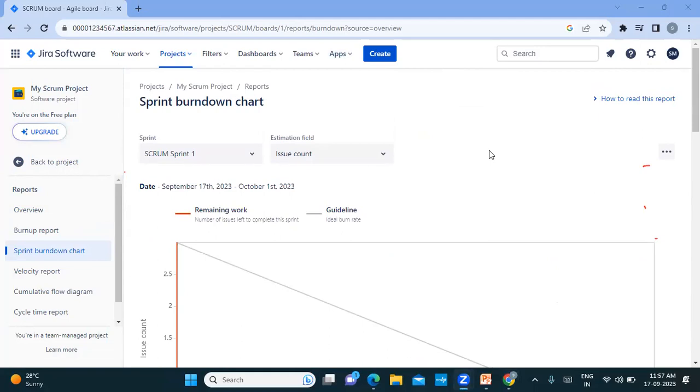Ma'am, just wanted to know, suppose the Scrum Master has done everything in the process, and it goes to the developer, who also updates it in the chart. Once the project is complete, you have to do testing, no? Yes, only the developer has done the development job. The tester is not there in Jira, notice. After this, it will go to the testing team. The testing team will do the testing. After UAT, it is completed. That's why I'm asking, because the chart shows it as completed once only the developer has done the development. The testing is not done yet. It's a task oriented chart only. Yes.